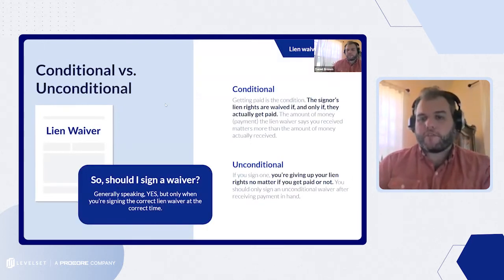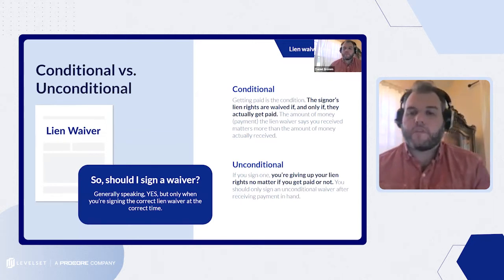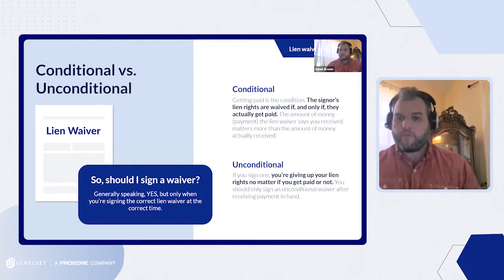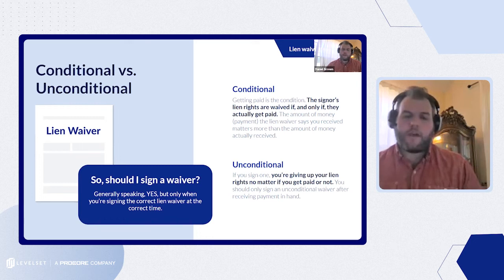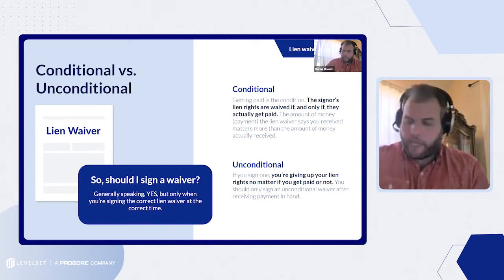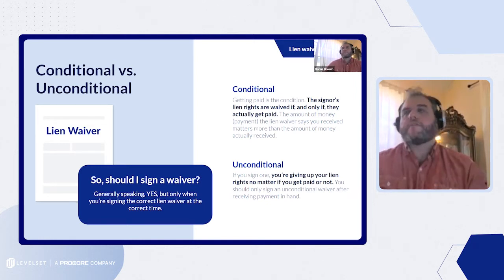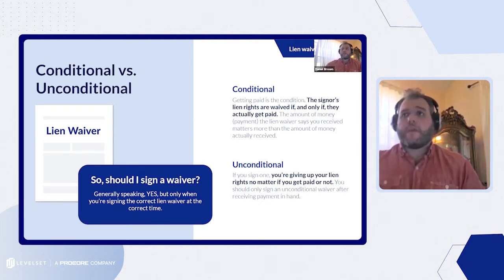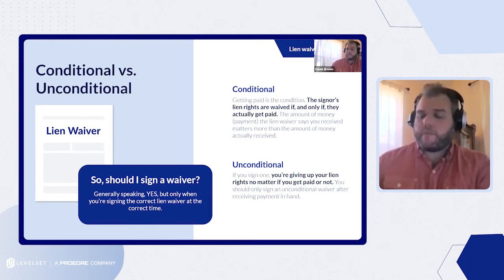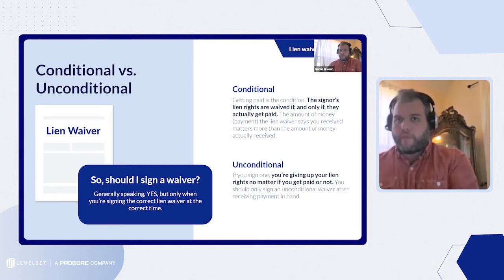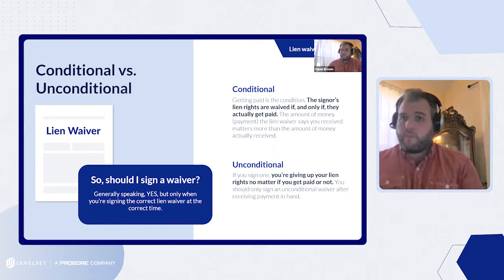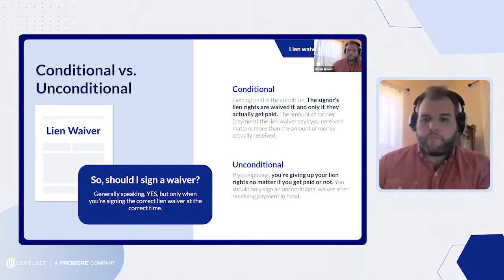The difference between conditional and unconditional is pretty simple. A conditional waiver states it is only effective if you actually get paid the amount stipulated on the waiver. Unconditional means you're signing away your lien rights on that much money for that job right there in the document. You should always sign a waiver, but only if you're signing the correct lien waiver at the correct time. Signing the wrong waiver could mean giving up some of your lien rights. Sending or requesting the wrong waiver could delay payment, because owners and lenders don't release payment until they've collected all the waivers for that pay application — and if some are the wrong type, that can hold up payment for the entire chain.